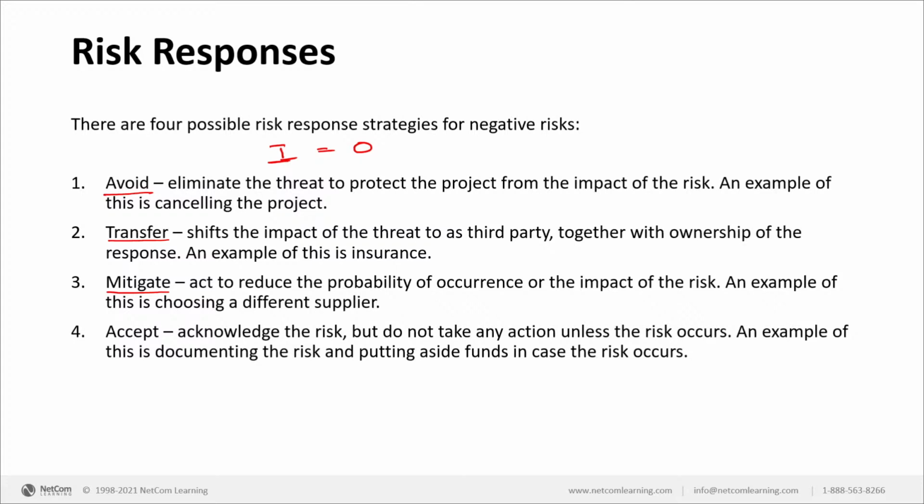And the last one is accept. Acknowledge the risk, but do not take any action unless the risk occurs. Why? You realize that the risk in itself is not that big. Probably preparing a plan and taking action right away may actually cost you much more time and much more money than the actual risk itself. So you simply go ahead and accept it.